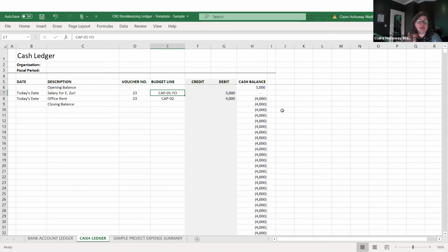So be aware of what your funding partner's expectations are in terms of requiring permissions to reallocate funds between budget lines. Generally speaking, you may have an overage in one budget line. The main thing that I think most funders are concerned with is that the bottom line does not change. So if you have overspent in one budget line, the first thing that you're going to need to do is figure out where you can save money on another line so that your bottom line does not exceed the amount of money that you have to spend, and you can't spend more than you have.